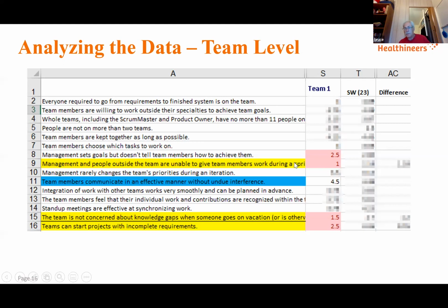So when we're meeting with the teams now, not only are we taking these assessment results for agile maturity, but we're using them as the basis to meet with the teams and start asking questions. One of the things we found was that originally we would just meet with the Scrum Master and the product owner and say, here's some suggestions, what's going on. But sometimes those suggestions and discussions never got down to the team level. So now we send out the results for a particular team. Team one would get their results, and they wouldn't see all the other team results because it's not their business. We send that out to the Scrum Master and the product owner first, and then we meet with the team, the Scrum Master and product owner to have a discussion. What can be improved and so on.